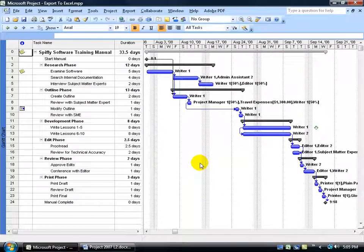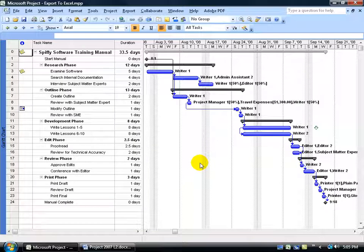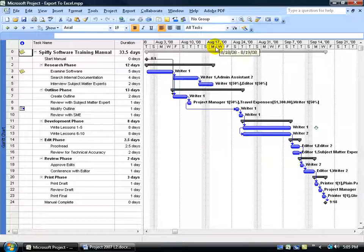The Status Date is used to check a project's status at a specific point in time, and it's typically used to enter or view progress information on a past date. As you can see up here, my project was back in 2008, and the current date today is 2009.